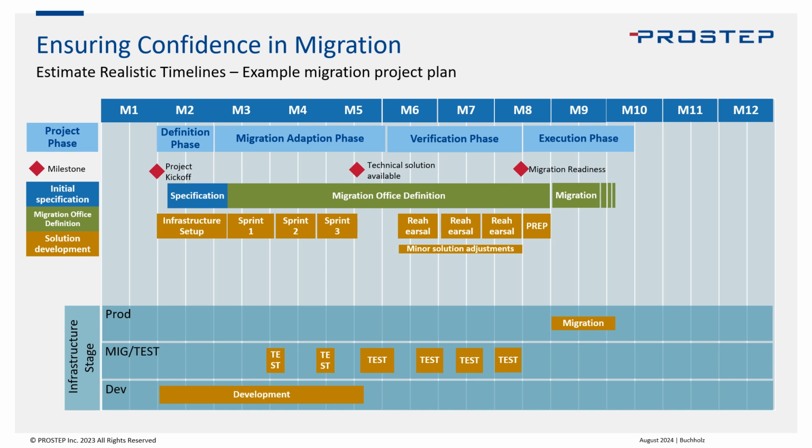Don't plan for just one rehearsal, because each rehearsal will probably give you information about the current status. It's absolutely normal that you find additional things that you want to implement or change when you're talking about the whole data that you want to migrate. So always plan for minor solution adjustments in between. And I would at least plan for 2 rehearsals.